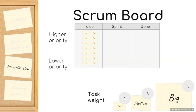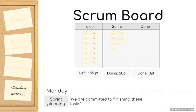With points assigned to tasks, we can estimate how many points we have in a project. Here you can see a project with a weight of 155 points and nothing done yet. On Monday, we have what we call a sprint planning meeting. This normally takes somewhere between 30 and 45 minutes where we're evaluating all the to-dos, prioritizing them, and identifying those we're committed to finishing by the end of the sprint. In this case, I've taken 20 points worth, which happen to be five tasks — some small ones and some big ones.